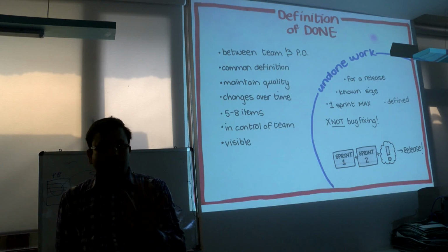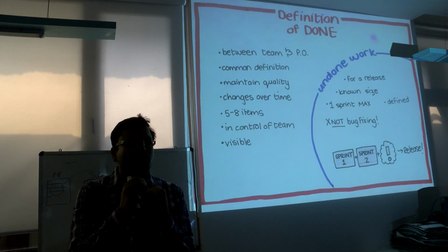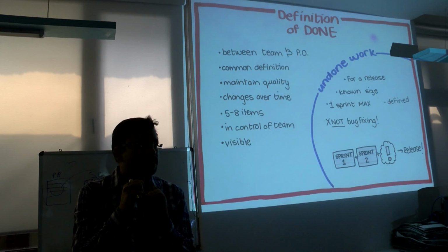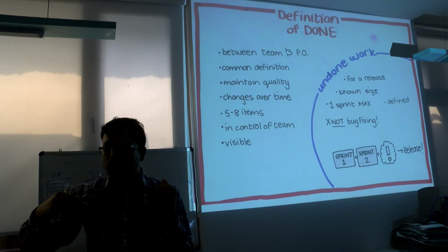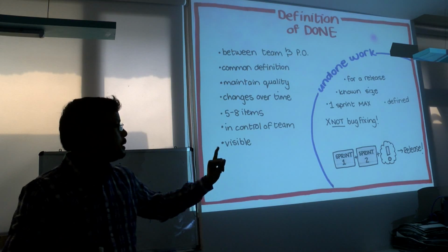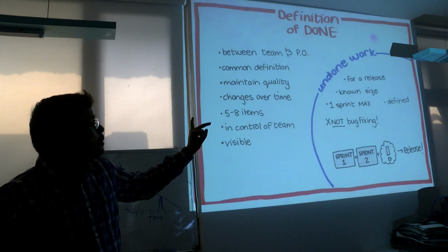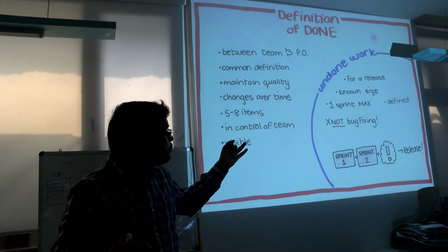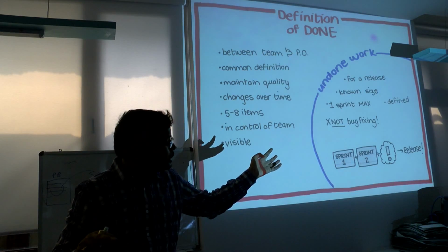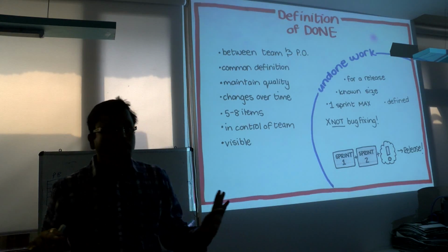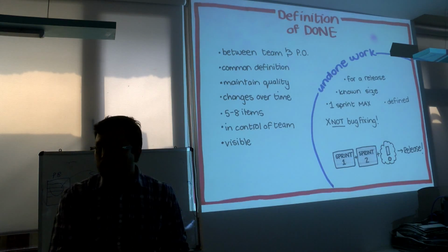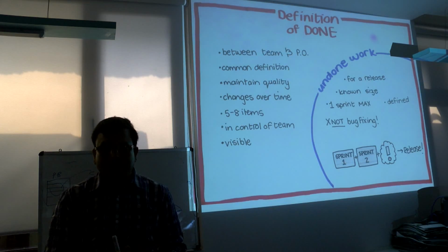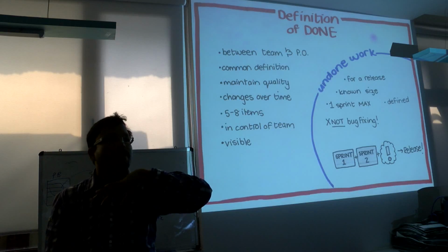Two things can happen here. One is that your job did not pass the acceptance criteria. In that case, your task will come back to the product backlog and stay there. Another possibility is that some task in a sprint didn't get covered. Maybe something happened, suddenly someone is sick and the task is still not finished. In that case, the same task goes back to the product backlog.